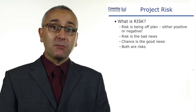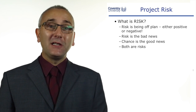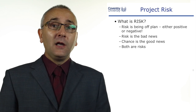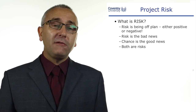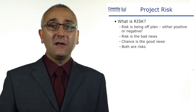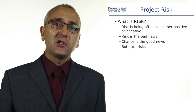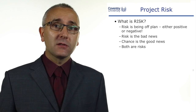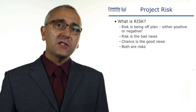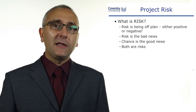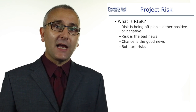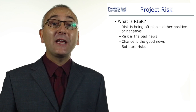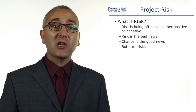You could be early or you could be late, but you are off plan, and both are risks. If you're late, that's bad news. There's a chance you're early — that's good news — but you are off plan. If you're going to identify a risk of being late, what are you going to do to stop that happening? What are you going to do if it happens? You ought to think about what if we are early — how can I encourage that to happen, and if it does happen, how can I capitalize on that?